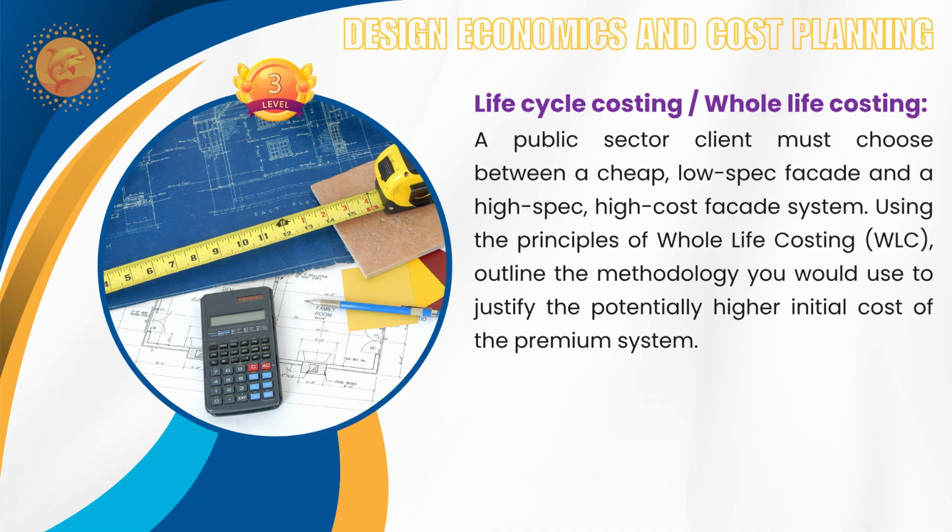So which one he wants to do based on the whole life costing. So we have to consider when you are applying whole life costing as a strategic decision making, we have to consider the entire cost over the asset's lifespan, like capital cost, design and construction, future maintenance and operating cost, something like energy, cleaning, repairs. So based on your benchmark only, you would be able to say the specialist subcontractor or the supplier, they would be giving you the tentative repair cost that may need to maintain the structure facade system.